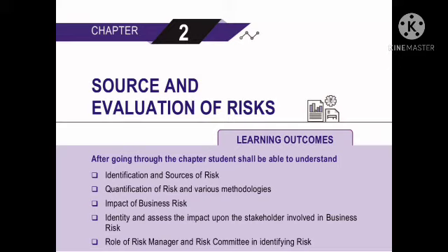Evaluating risks. Once the level of risk is completed, we then need to create a rating table for evaluating the risk. Evaluating a risk means making a decision about its severity and ways to manage it. For example, one may decide the likelihood of a fire is unlikely, a score of 2, but the consequences are severe, a score of 4. Using the tables and formula above, a fire therefore has a risk rating of 8, i.e. 2 x 4 equals 8.